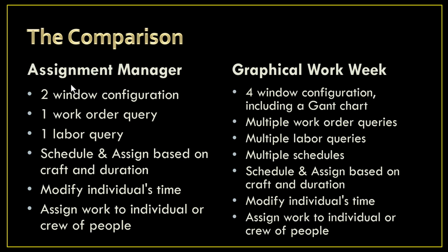So you have the ability to put multiple work order queries. So you might have all your PMs that are due in this month or this week. And then you have your CMs separate from that. And then maybe you also have backlog. You can start out with that query and that schedule having just your PM work orders. You get those all scheduled. Then you go in and you add that CM query to that same schedule and you divvy out those work orders. And then if you see people still have remaining time available, then you go in and you add the backlog. Likewise, you can change people's schedules in here.